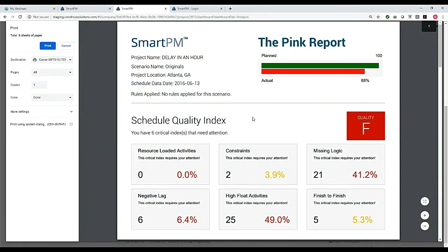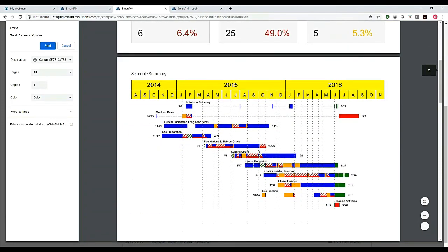So this analysis that was run on the last update, I can now see a version of my entire analysis with my historical critical path. I can see what delays happened to what areas over time. I can see which schedules were imported over time and where that critical path was. And I can also start to see whether or not there was compression happening and any potential concurrent delay issues happening in the period in orange here.